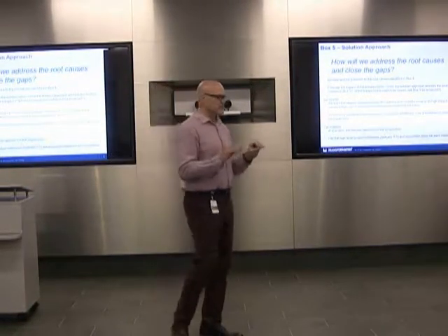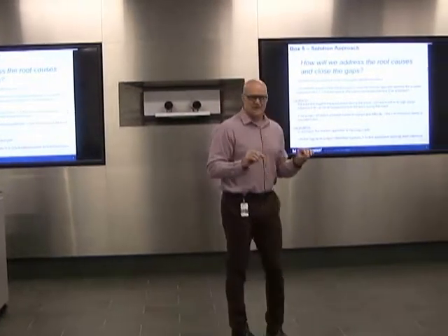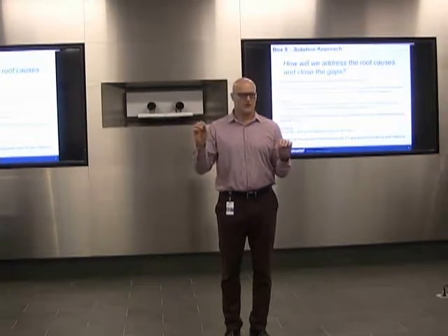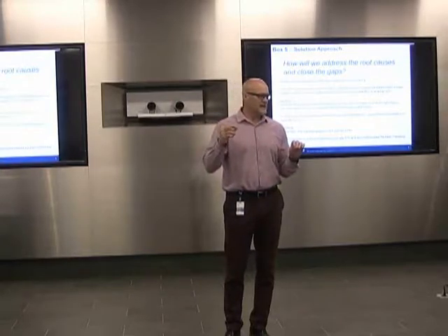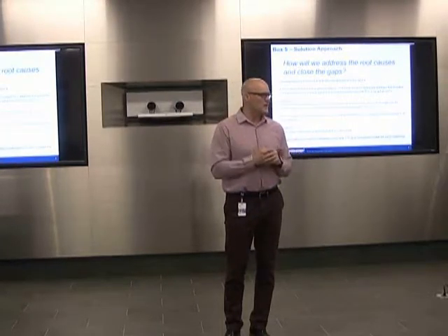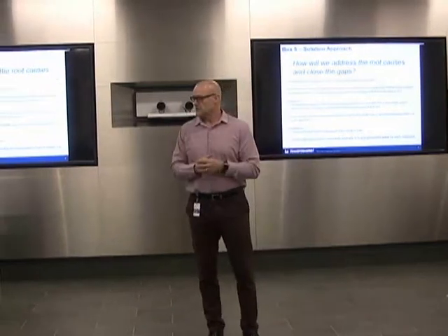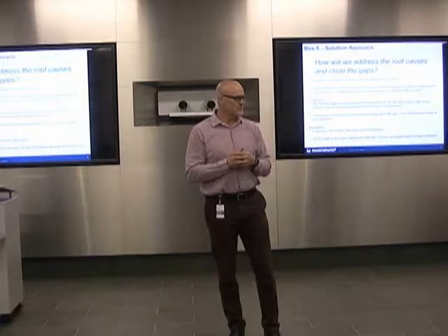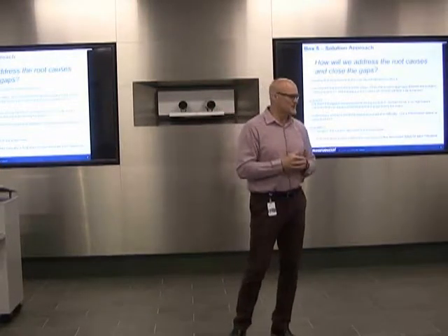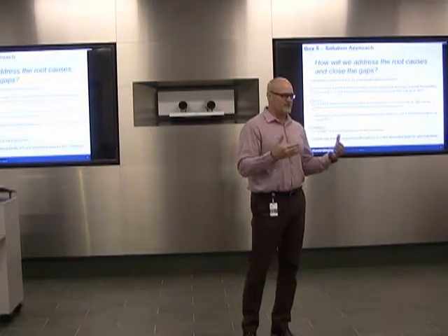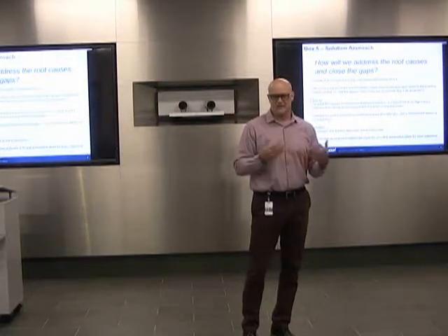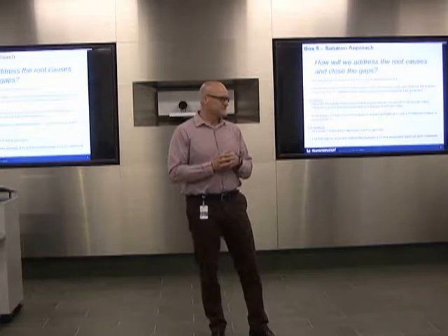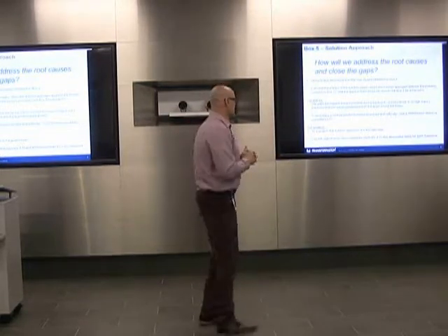And ideally, you guys make it so simple that you can see red or green next to your milestone, whether you hit it or not. And so it identifies where you are. If you're red, you're behind where you thought you might be. You passed the date, right? It's not a crisis, it's just that, hey, it needs some attention. We need to find a way to get it back on track. If you're green, you don't even have to talk about it. You get to say, this is what we're doing next, right? So it's really a pretty simple process.